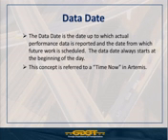It's not going to allow you to hold information prior to the data date. If it hasn't actually started, you can't say it's actually going to start yesterday. Now, if you make a mistake and you have forgotten to update something, you'll notice when your schedule gets pushed out erroneously, and you can always go back and make corrections as need be.